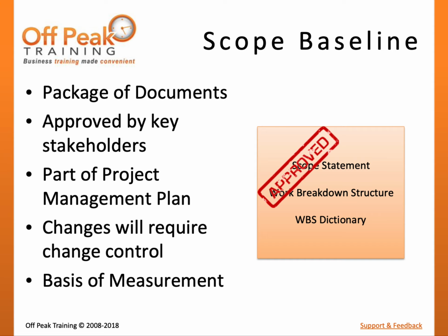This means that once a baseline has been approved, the only way for it to be changed is through the approval of the Change Control Board in the Perform Integrated Change Control process. Baselines will also provide a basis for measurement to compare actual work performance against planned performance during monitoring and controlling.